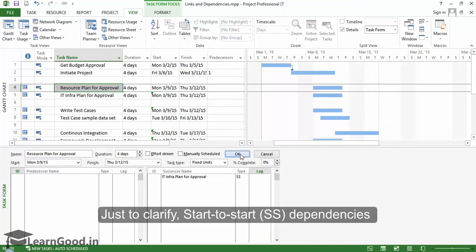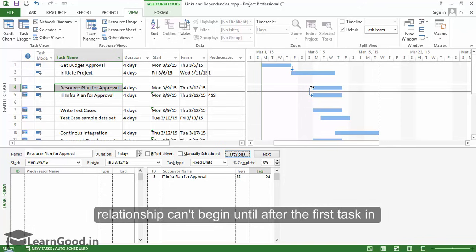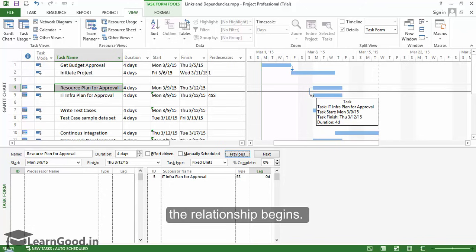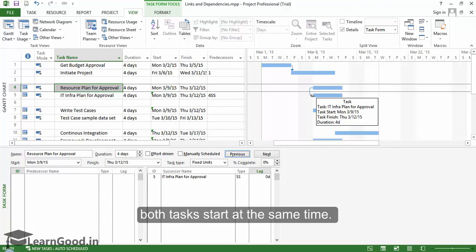Just to clarify: Start to Start dependencies are used when the second task in the relationship can't begin until after the first task in the relationship begins. Start to Start dependencies don't require that both tasks start at the same time. They simply require that the first task has begun in order for the second task to begin.